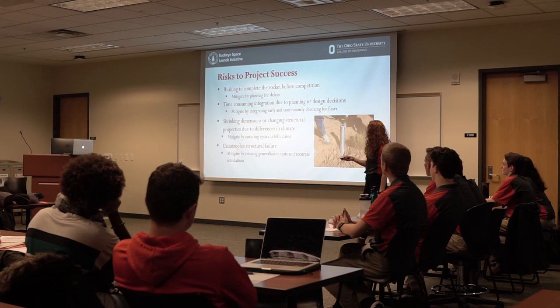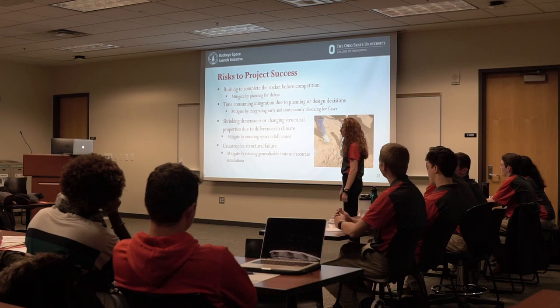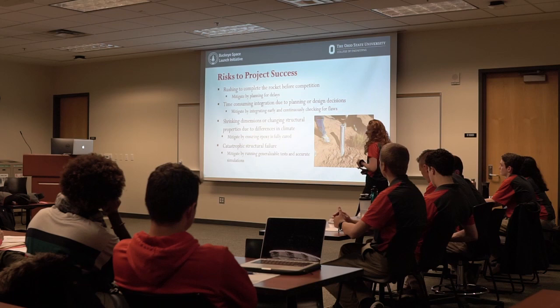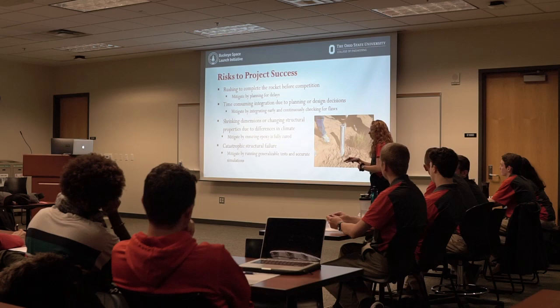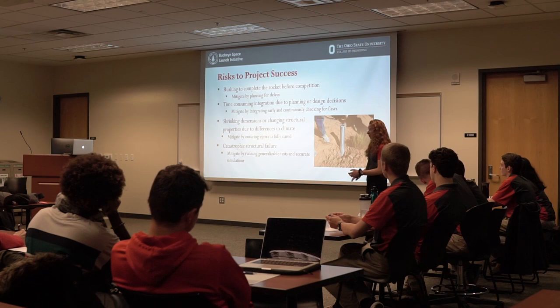Okay, so risk to success. I think the structures team is famous for being behind. It's usually because of delays that we encounter that we just can't predict. So I'm not going to say that there's not going to be delays, because there will be. But we can plan to have most of our busy stuff in the coming months so we can try to get all done, and then have months later on where we make up for the delays. So we'll do that. And another one is time-consuming integration.